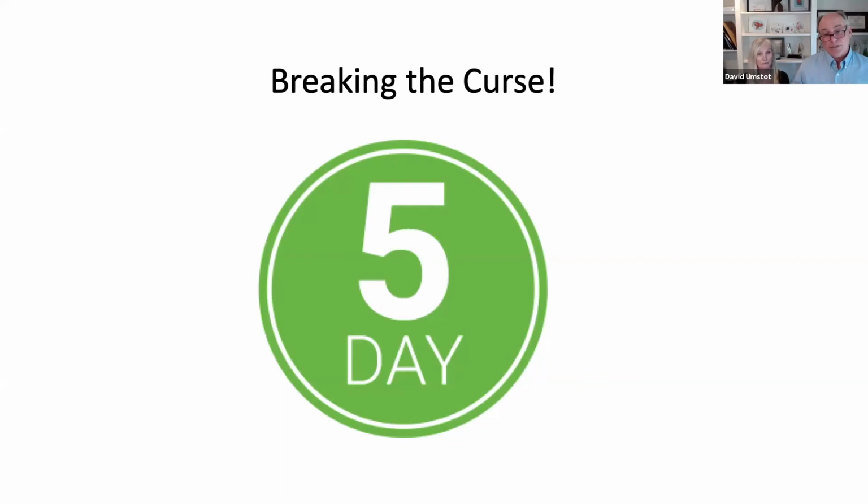Part of that is just a remnant of the way we've traditionally planned. We're used to planning in weeks in a Gantt format, and people plug in 5 days. What am I going to do this week, as opposed to what does the actual task take? So it's not a zero-based approach where you ask what level of effort I'm actually going to need. It's more of, well, I know it's going to take me 2.5 days, but the last job I was on, that didn't happen because of X, Y, and Z. So I'm going to say 5.